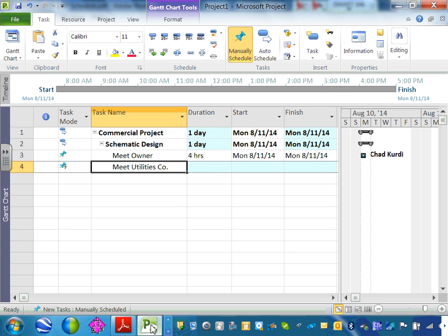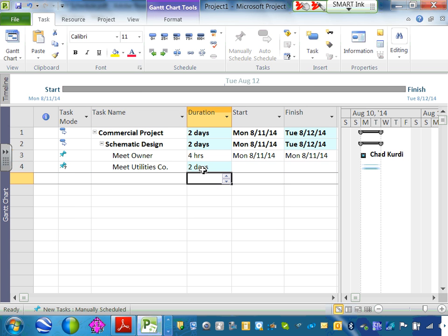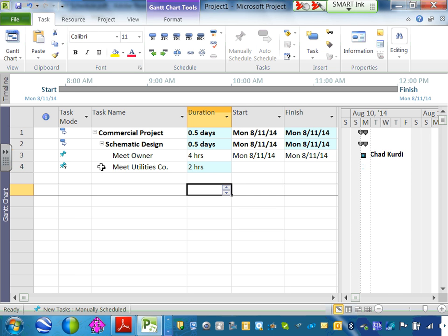So we're going to assign 2 hours, put 2. I think if you put 2, no, 2 defaults to 2 days. You have to do 2H to default to 2 hours. Okay, 2 hours. Now, I need to link. When you guys are done with 2 hours, give me a thumbs up, Chad. Okay. I would like you guys to link them.